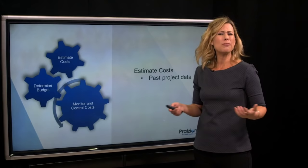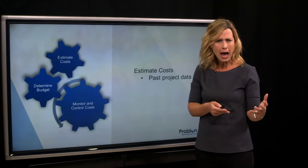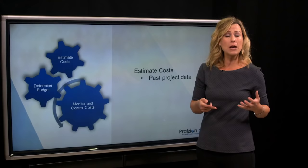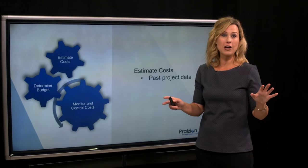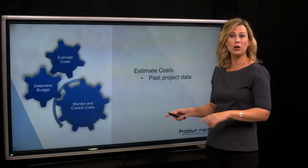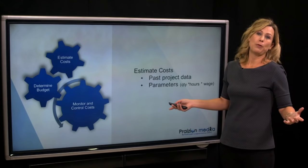Estimating costs means actually saying, how much money am I going to spend? In the PMP world, we break down our scope of work into a work breakdown structure with work packages, and we break those work packages down into activities. In the non-PMP world, you might simply open up Microsoft Project and type in the activities, resources, and their pay rate. In an environment that's totally not project-based, you might just have past budgets or performance reports that indicate how much you normally spend. Sometimes past data is wrong, because prices go up.